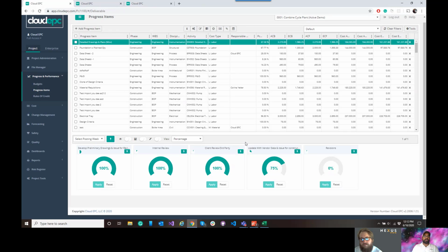But if we are a contractor or an engineering organization, we want to probably have a different level of detail for our work packaging to be able to earn out our project. And so in this case, we're loading this as, let's just say, a demo power plant, and we're going to load engineering, procurement, and construction work packages into a single database.